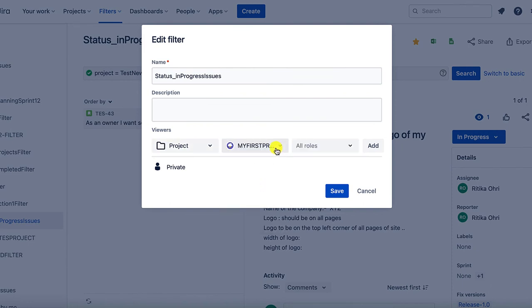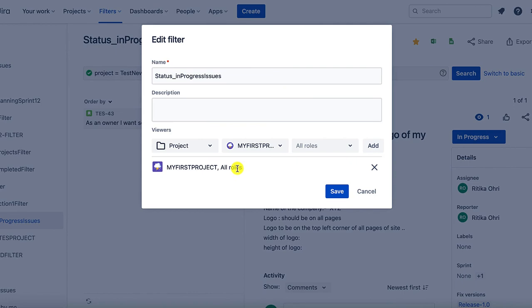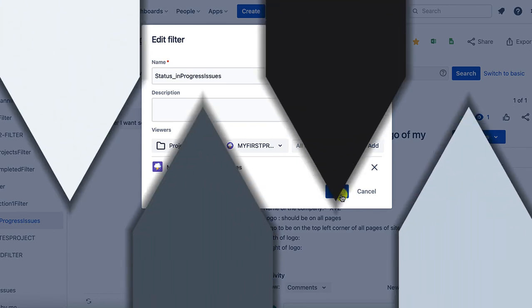Let's say I want to provide read and write access rights for all the roles within my first project. Then I can just go ahead and do an add. It has provided the access rights to all the different roles in my first project. Now let's go ahead and save it.